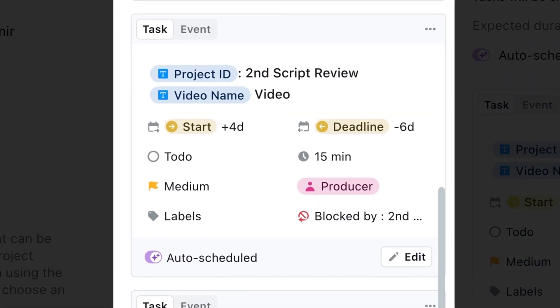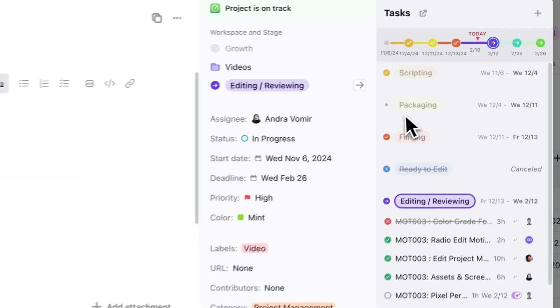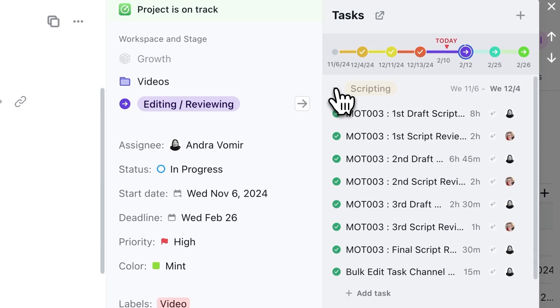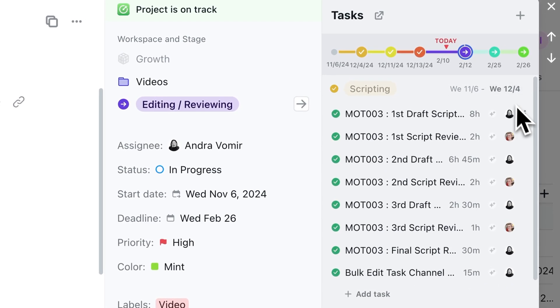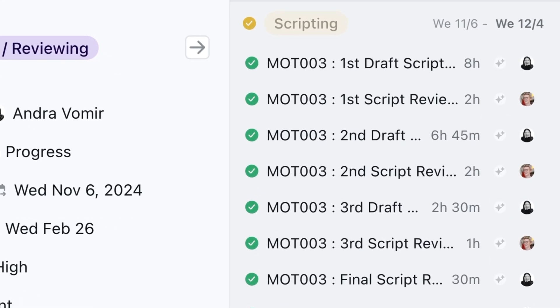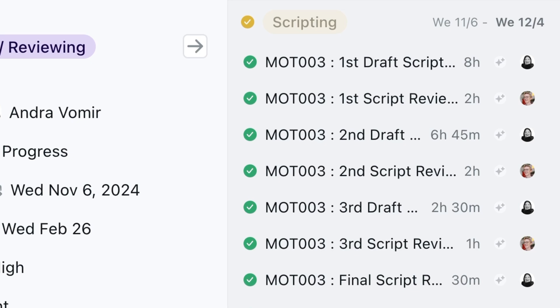So a few tips here. With tasks, you want to create one every time there is a handover from one person to another. For example, for our script writing stage, myself and George pass the script back and forth at least three times, and this is mapped out in our process.